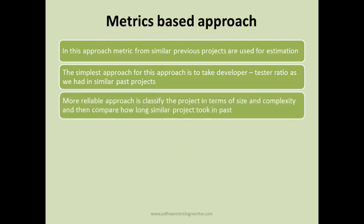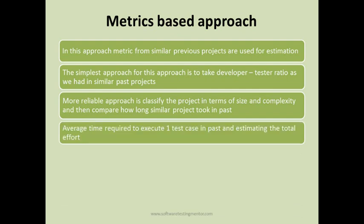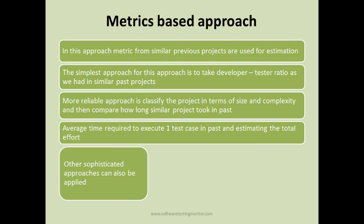A more reliable matrix-based approach is to classify the project in terms of size and complexity, then compare how long similar projects took in the past. You consider what size and complexity the previous project was, and compare that with the current project. Another approach is to use the average time required to execute one test case in the past — for example, if it was one hour per test case, you use that to estimate total effort.